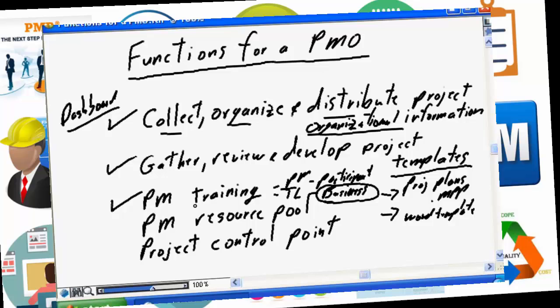So by having the project management expertise focused in the PMO, we have an excellent consolidated source for project management training. As mentioned previously, a common requirement, a common focus for PMOs is the actual resource pool. All project management staff, whether they be actual project managers, team leaders, or project coordinators, are responsible to report into the PMO. And then when a business unit wants to sponsor a project, they would come to the PMO and say, I need a project manager, I need a team leader, and the PMO would staff out, assign the project manager to the business unit from this qualified, trained resource pool.